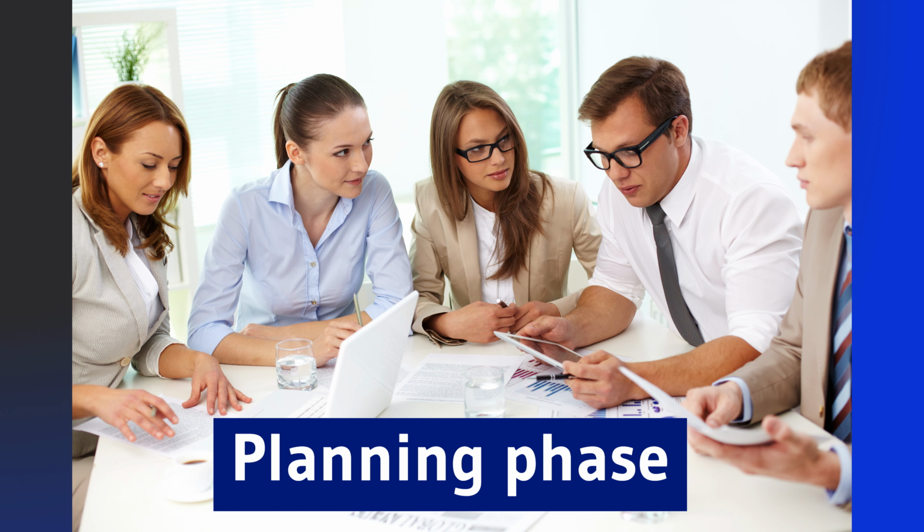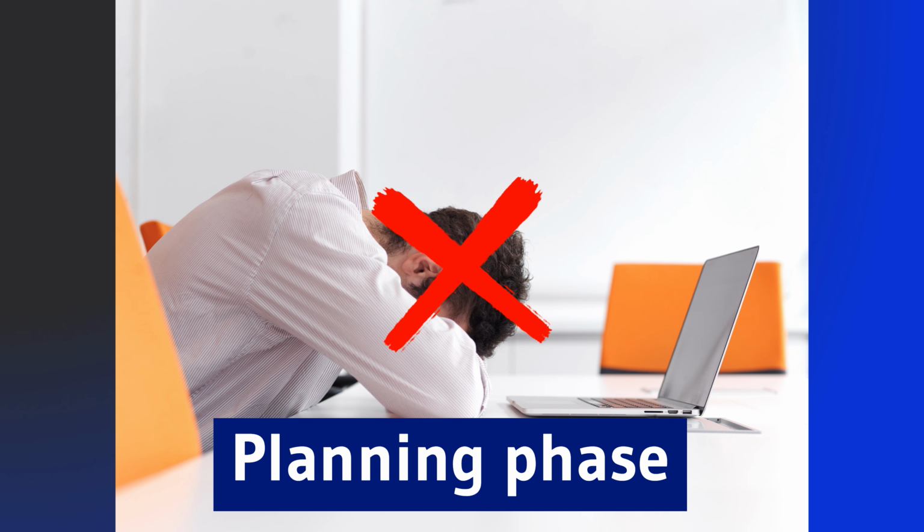So in this phase of the project, hiring more analysts potentially would only increase chaos and issues with communication, and achieving any schedule compression here would be very hard. There is also another situation where the trade-off between time and budget is not working well, and I will focus on that a bit later in this video.